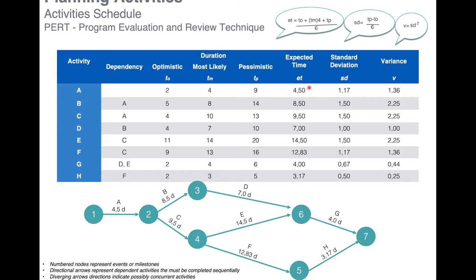Then we establish the expected duration for the activity. We calculate it as: optimistic duration (2) plus the most likely duration (4) multiplied by four (16), plus the pessimistic duration (9). That gives us 2 + 16 + 9 = 27, and then we divide by six.